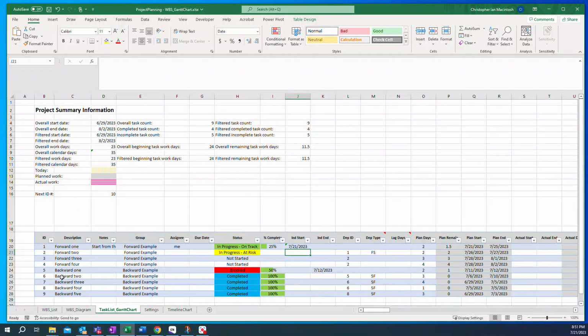So you'll see that I have a backward task here that I also gave a start date of July 12th, and I have a duration, and then I did the same thing where I knew the next task before that I wanted to complete, and that was dependent on the previous one, and I set the dependency type to start finish instead of what we previously tried, which was finish start. And then I created these other tasks that were also dependent on that, with duration in days.